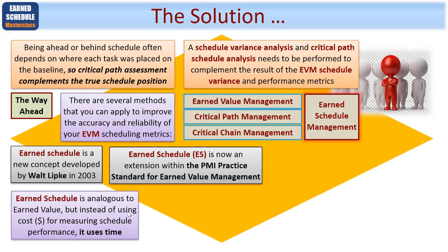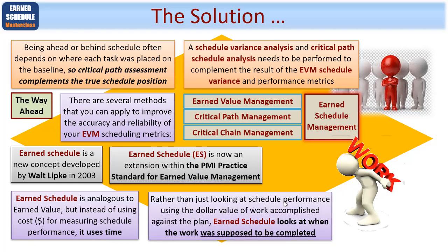Now, as you've learned thus far, Earned Schedule is analogous to earned value, but instead of using cost in some monetary units, dollars, pounds sterling, yen, euros, what have you, for measuring schedule performance, you'll be using time-based data. So rather than just looking at schedule performance using a dollar value of work accomplished against the plan, Earned Schedule looks at when the work was supposed to be completed, and this is its power.